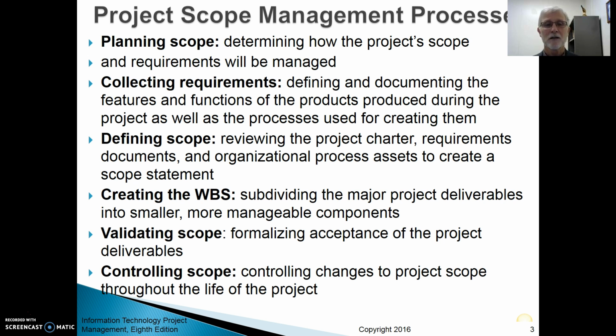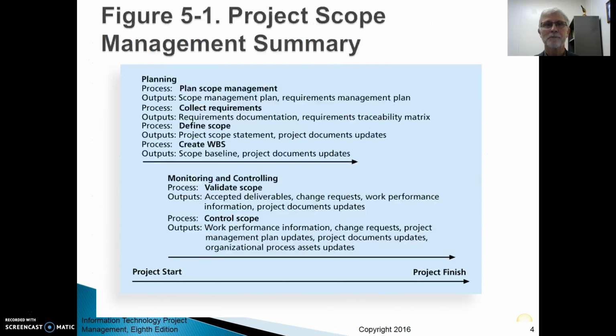Whatever the case may be, you've got to define those. And then, of course, controlling the scope. I've got to make sure that nothing gets added or subtracted from this scope without me knowing about it as a project manager. Because adding things to the project scope could change the cost, time frame, and schedule. So you just have to make sure you understand what that stuff is.